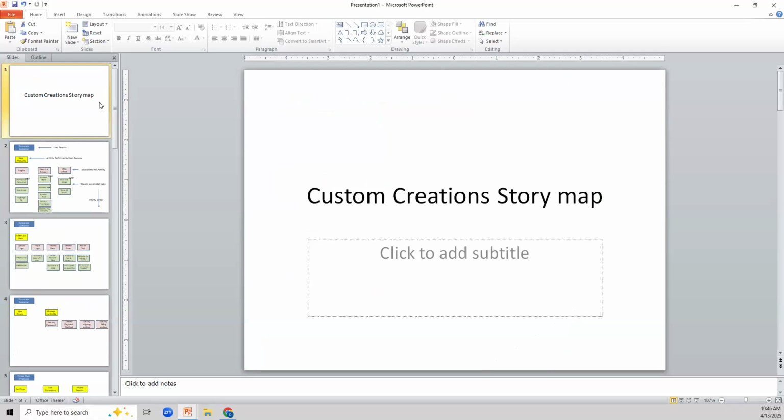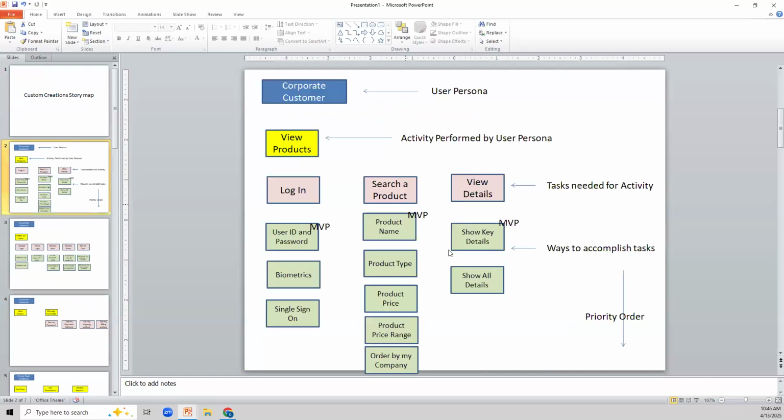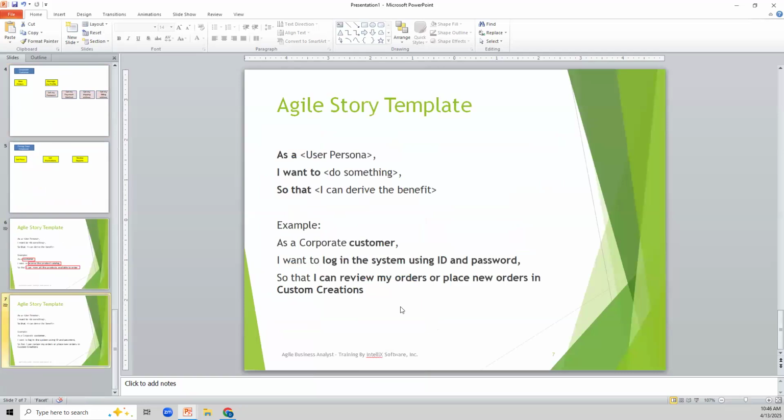So you create a stakeholder map, you perform interviews, and collect the data. Based on that data, you start putting together a context diagram, a process diagram, and a story map like this. Then you take those story maps and start converting them into specific Jira stories, which the developers will go ahead and implement.